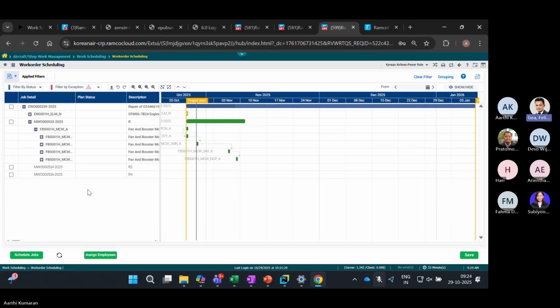show green. If your workload is more than the available quantity, for example out of 7 only 5 turned up that day and 2 didn't turn up for whatever reason, then it will automatically flag that you have a constraint on that particular day for that particular resource. So this is answering your question.